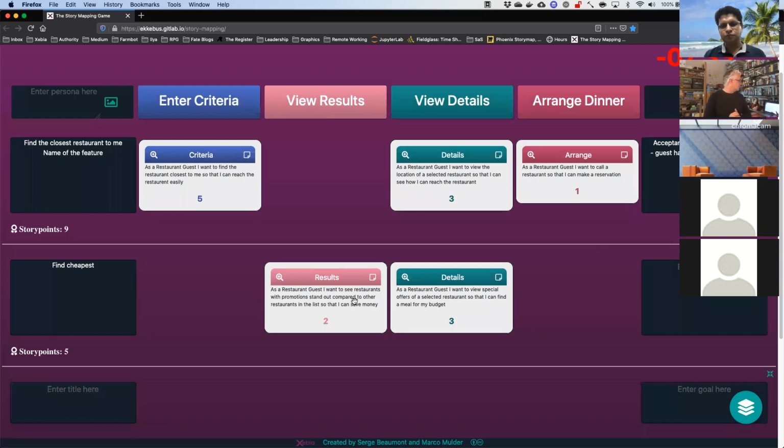Let's see. The story points mentioned here, are these presumed by the product owner or is it by the team? Never, ever, ever will story points be done by a product owner, ever. Otherwise, you're doing it wrong. Team only.